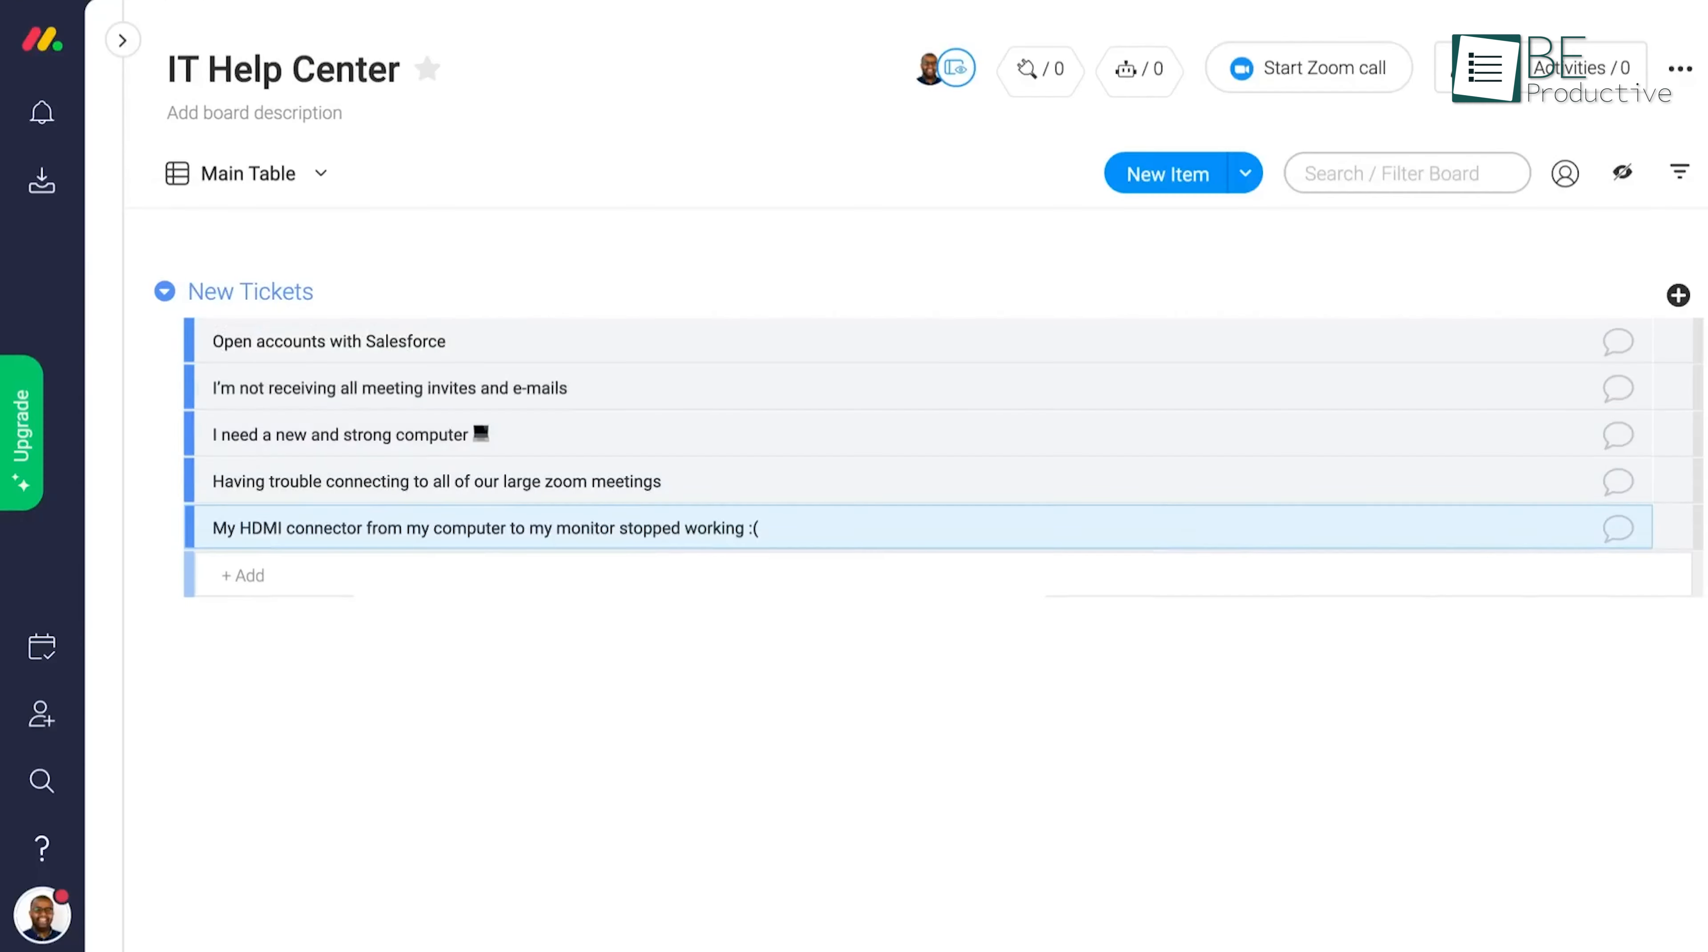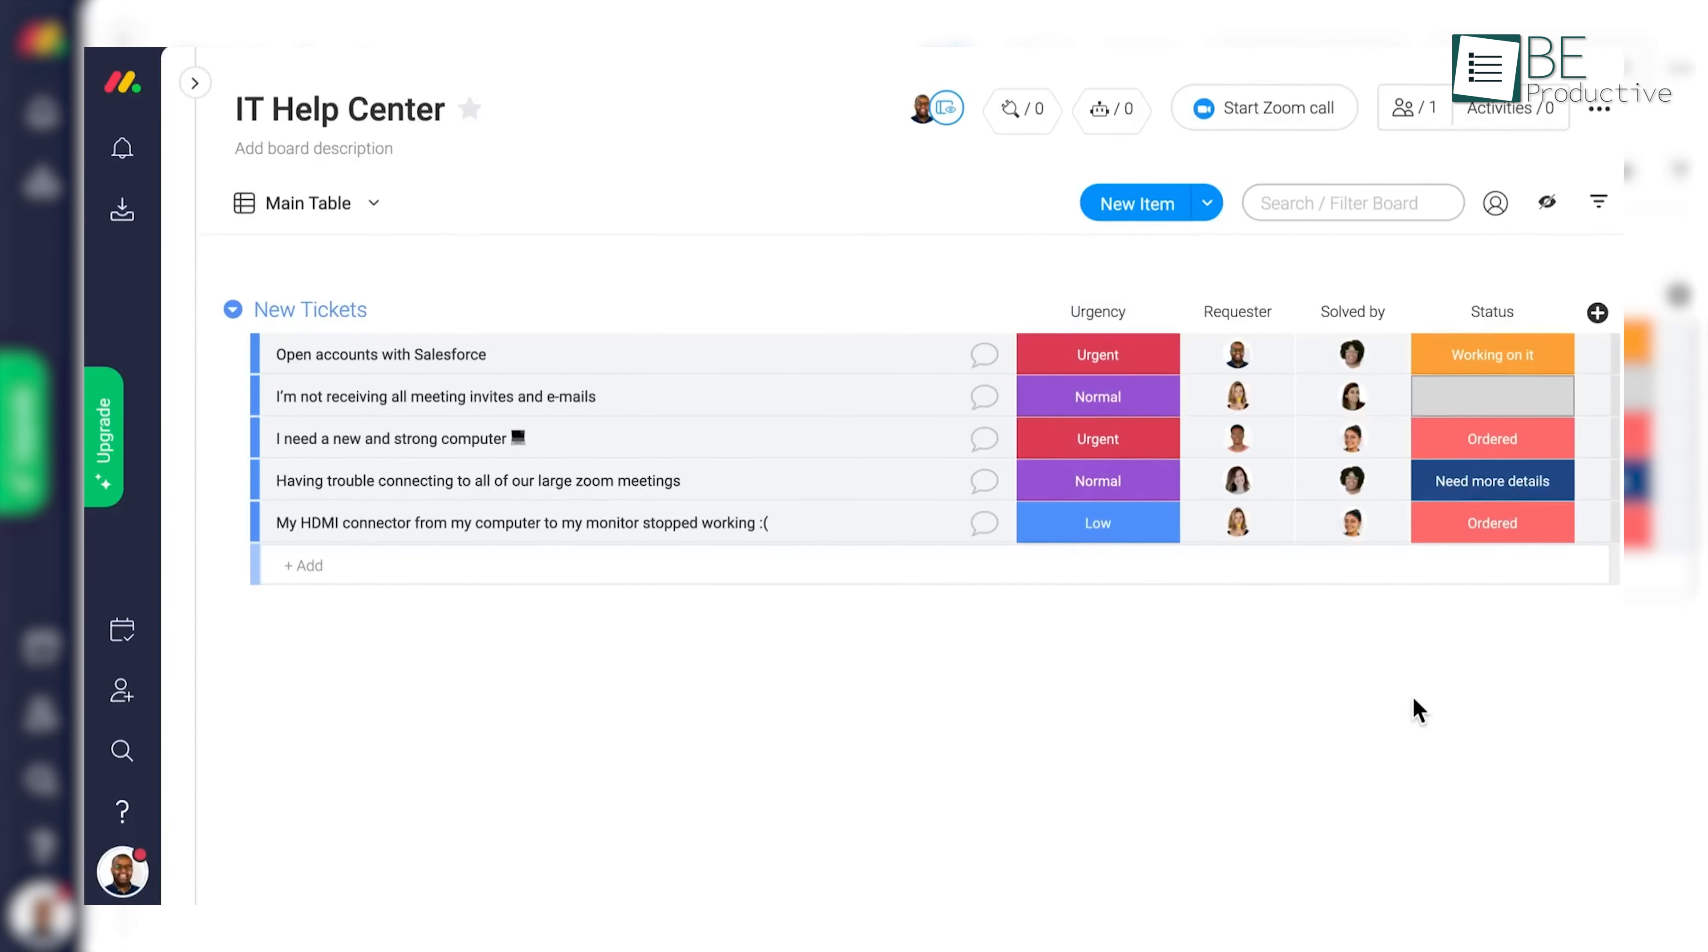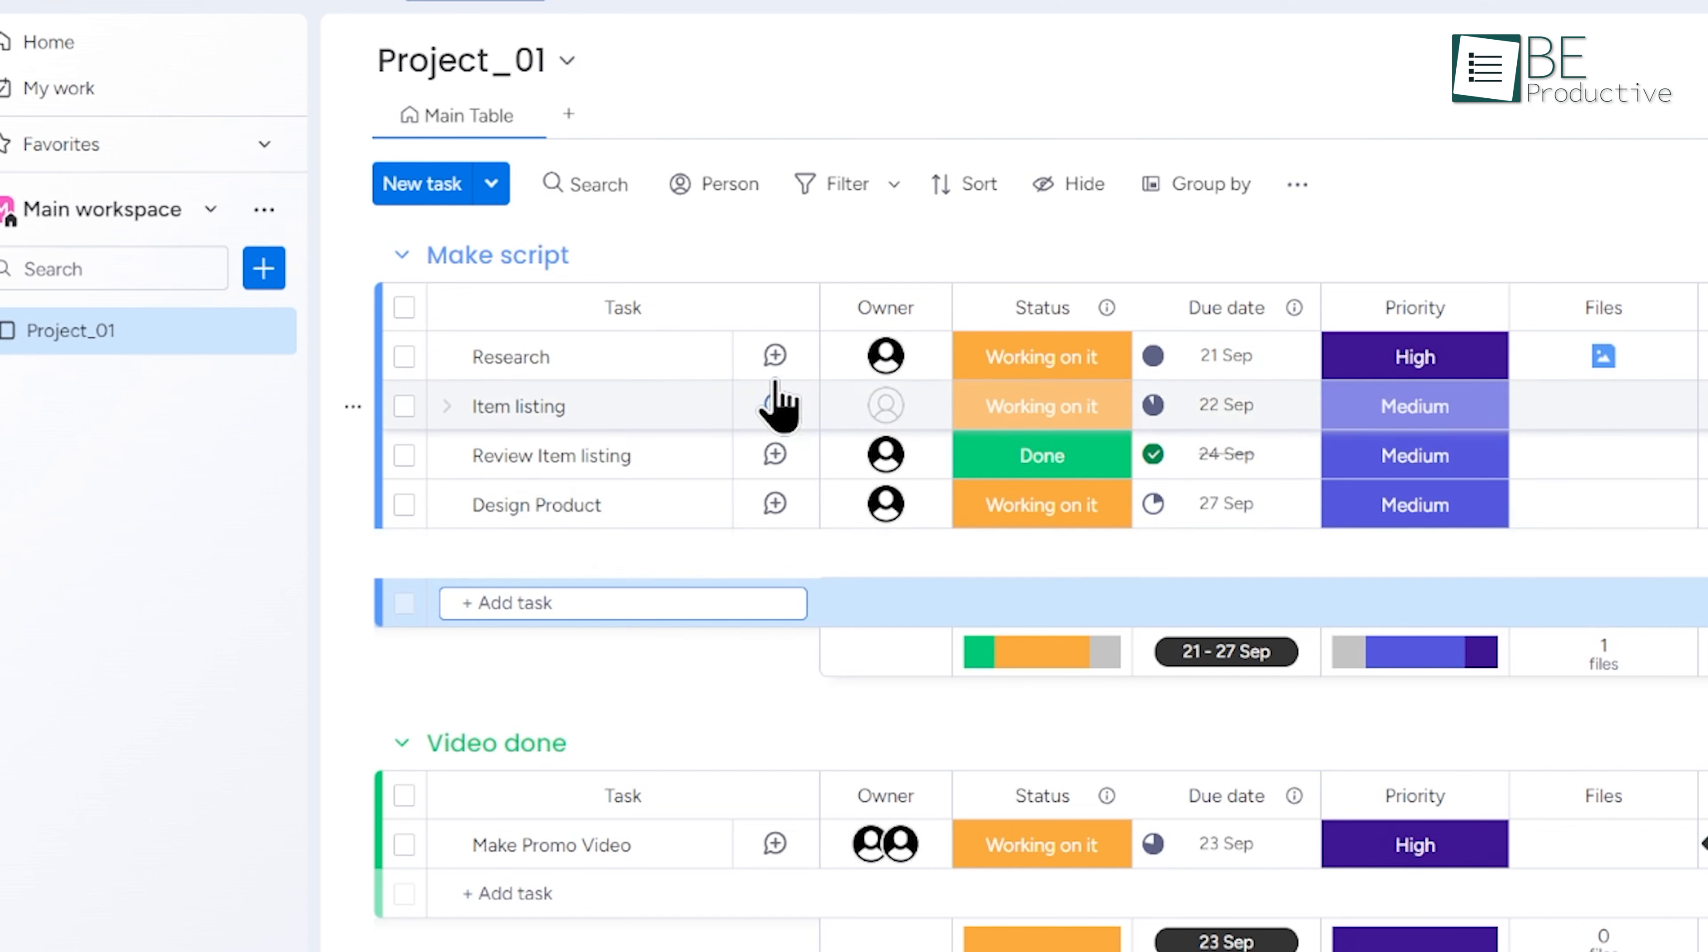To effectively manage your tasks in Monday.com, start by creating a board for your project. Once your board is set up, you can break down the project into tasks and assign each one to specific team members. For example, if you're working on a product launch, you might create tasks like design product and plan marketing campaign, and assign these to the appropriate team members.